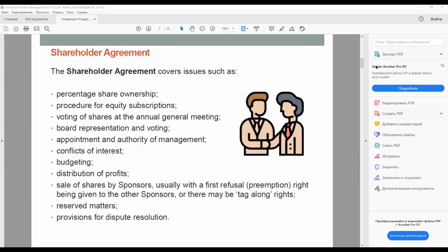So it's very interesting deadlock resolution. If both parties agreed upon having a Russian roulette as a deadlock resolution mechanism, they have a right at any point of time of the company to put a price. That means if your counterparty gives you some price, he is willing to buy out your share at this price, and if you agree, then you can buy his share for this price.